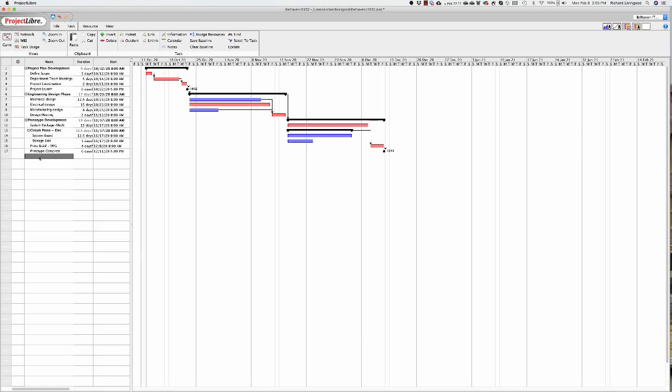And so you're working away and everything's going along fine. Then all of a sudden you realize, okay, now I've put actuals in here and oh my goodness, it's not ending in December. It's now ending at the end of January. Where's the critical path? And sometimes it's just one item. So let's say that the storage unit really created a problem. Let's say that instead of 5 days, it became 30 days. I mean, it just was a problem. And now watch what happens.